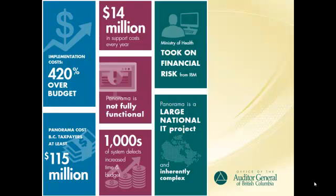This graphic from page 7 of the report summarizes some of the report highlights. A complex national IT system such as Panorama is undoubtedly a challenge to build and implement. At the time of our audit, Panorama was 420% over budget, 5 years late, and did not meet expectations. Years of delay means that Panorama may already be outdated. So far, Panorama has cost the province at least $115 million and annual maintenance costs are approximately $14 million. As well, the system contains thousands of defects, with new defects being discovered regularly.